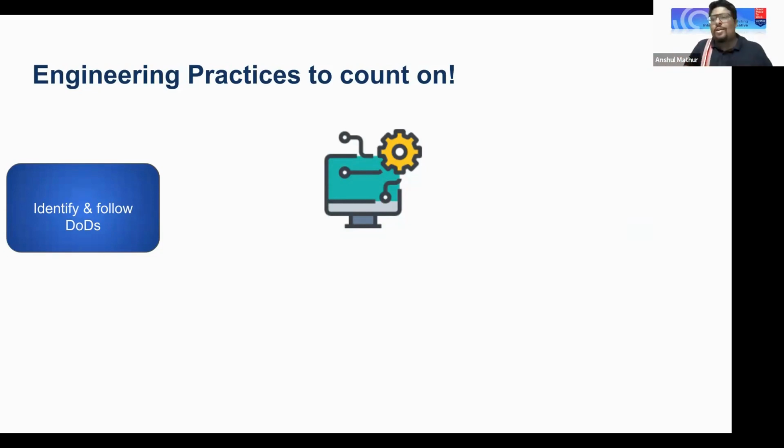So a bot running on a PR will put a checklist, and that PR would be merged only when all the checkboxes are marked. So that the owner of the PR would make sure that, okay, logs done, tests in the PR updated, my code coverage under check, communicated to the right teams, done. Things like that. So have a definition of done, otherwise it's easy to be inconsistent in your delivery, and that is because different microservices would have different objectives and different paces of deployments.